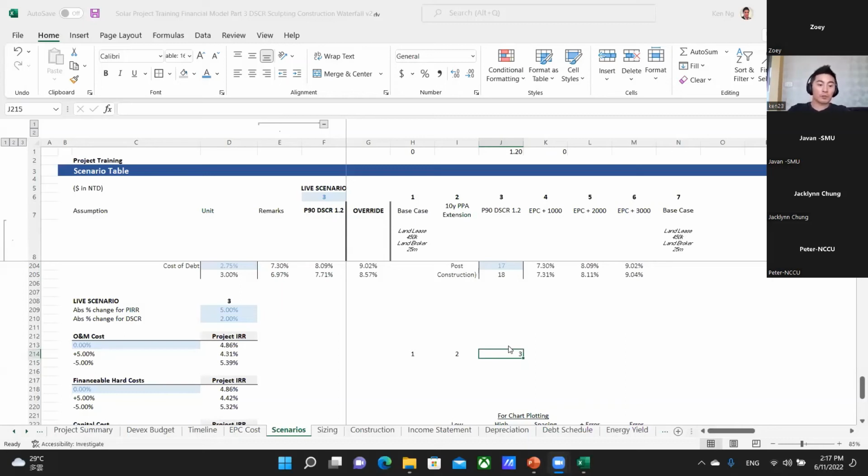So this is called a multiple on invested capital. This is a number that we pay very, very close attention to in the development game, especially for the initial permits, because it's higher risk at that point in time. We want to make sure that for every dollar that we're investing, we're getting a decent return for taking that risk. So for the initial milestones, we generally try and target at least a 2 times return on our money, ideally 3 times or more.